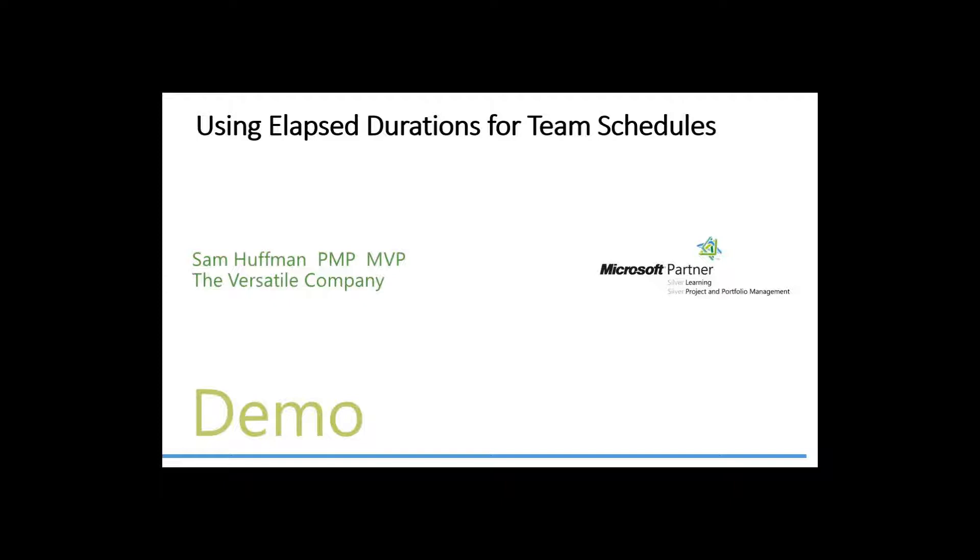You know or should know by now that when you put a duration or assign a duration to a task, that is working duration, meaning working days. So if you had, for example, a two day activity that started on a Friday, you would know that it would finish on Monday, the next week. That would be a two day normal duration.